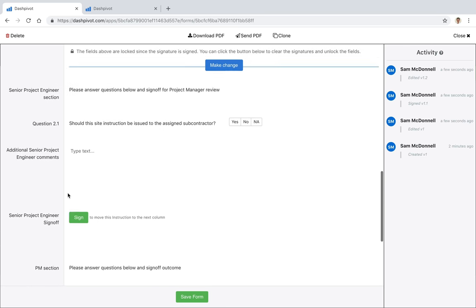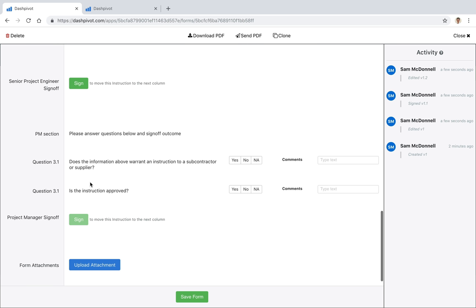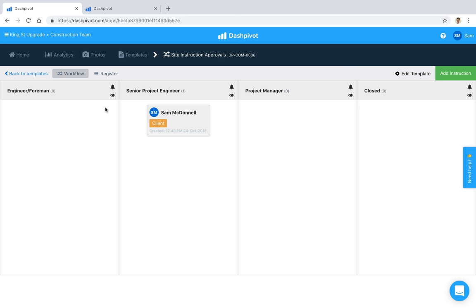If I open up the form again, this next approval signature is enabled. The thing about approval signatures is that you need to do them in order, so you can see that this one is disabled. I can't do it yet because this one hasn't been signed off. That's basically how the approval signatures work.